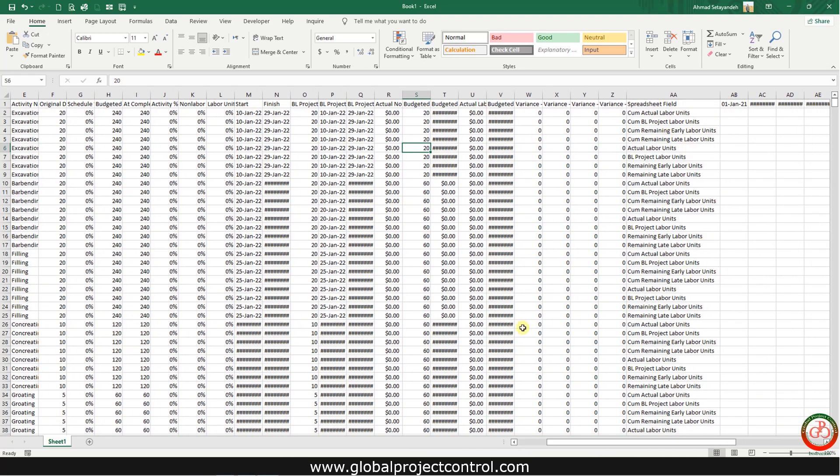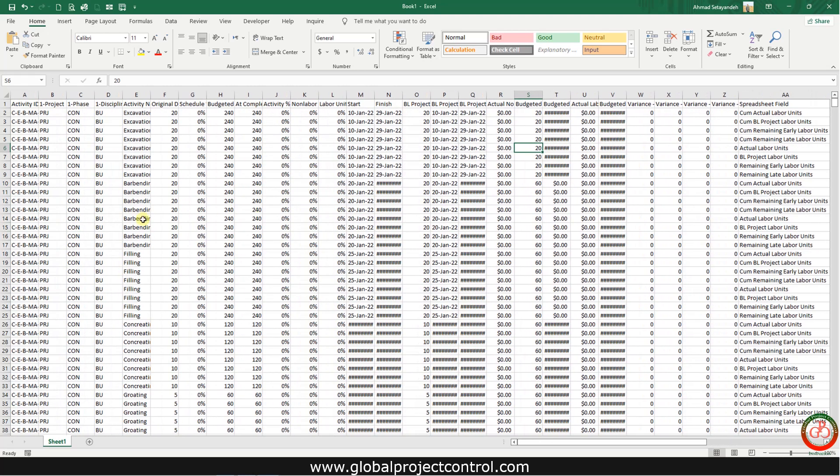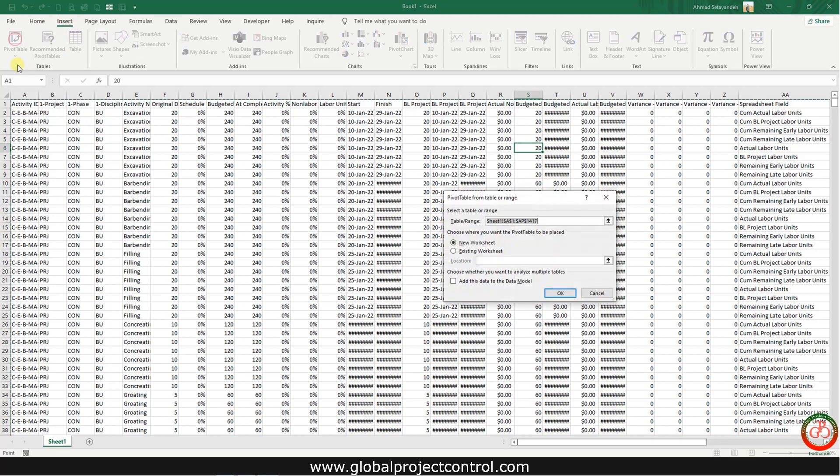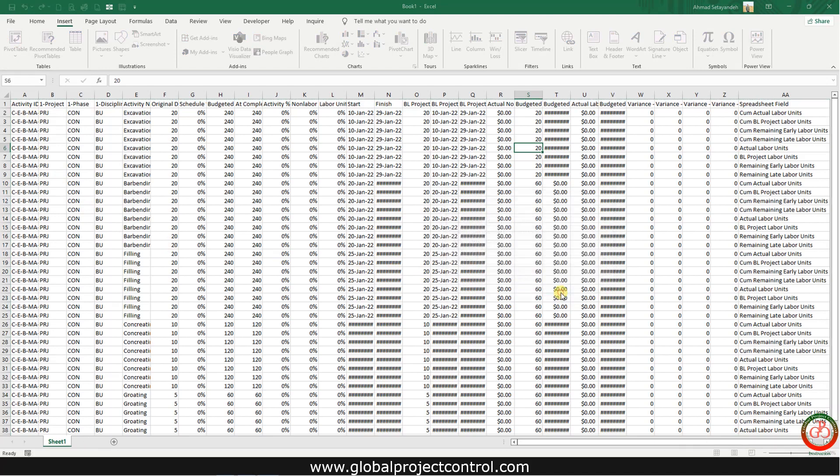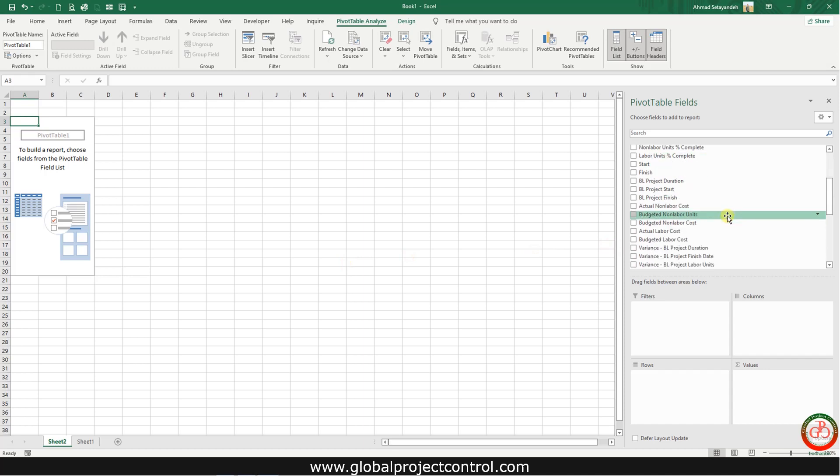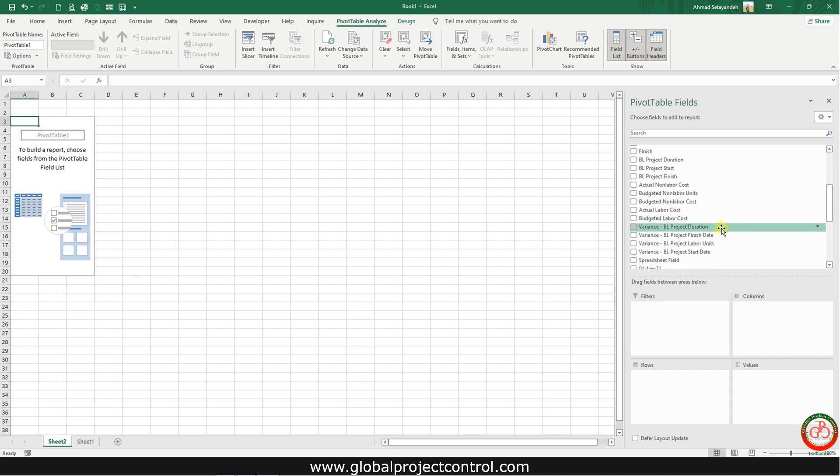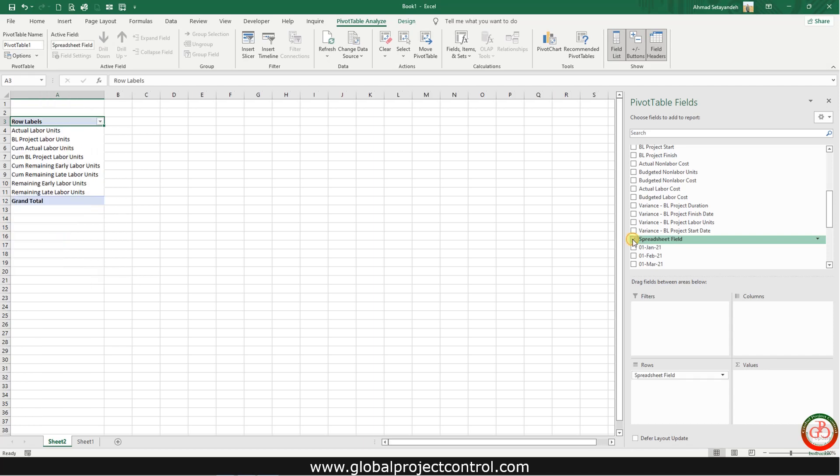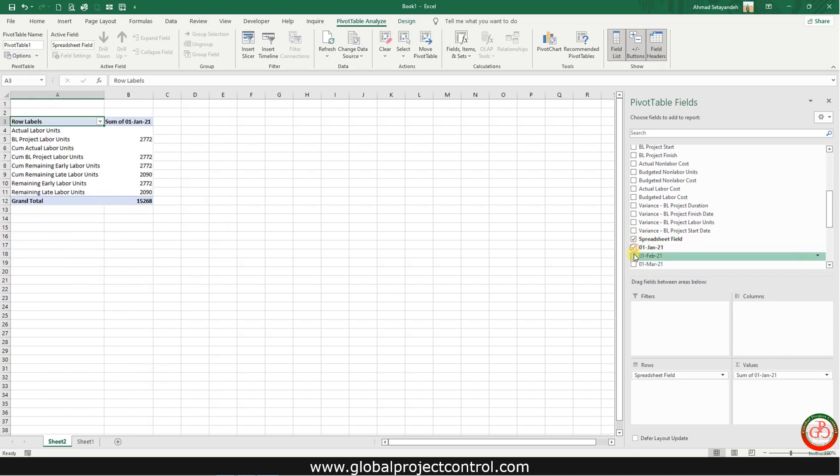By this database you can create this S-curve. How? Go to Insert and change it to the pivot table. Select the spreadsheet and then add all your monthly information.